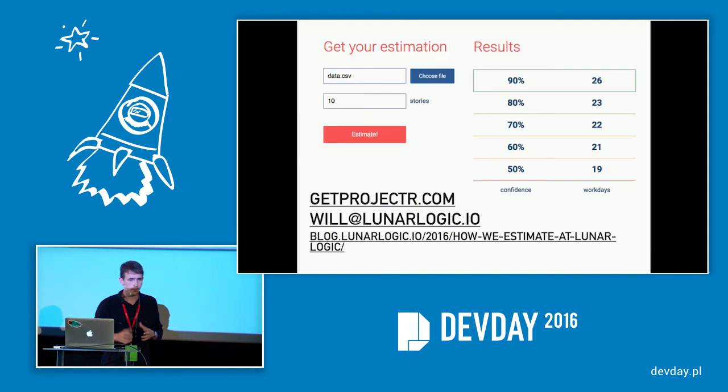Yeah, so scope creep. Depending on your project, your team, how it works at your company, we can also simulate scope creep. So in general, you might just say, oh, we might get like 10 new tasks within a project. Or we can look at a past project and say, oh, this one, we started with 20 tasks and it ended up 25, and work out a factor. You don't have to actually rerun the estimations for the whole bunch, because you allow this buffer of some tasks that will come in. It depends on the assumptions that you have at the beginning, and you can work them into the estimates that you choose to make.